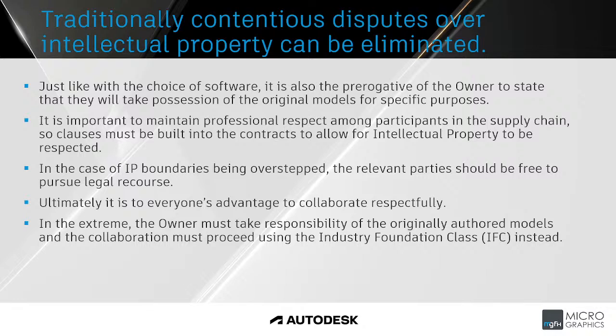Just like with the choice of software, it is also the prerogative of the owner to state that they will take possession of the original models for these specific purposes. It is important to maintain professional respect amongst participants in the supply chain, so clauses must be built into contracts to allow for intellectual property to be respected. In the case of IP boundaries being overstepped, the relevant parties should be free to pursue legal recourse. Ultimately, it's to everybody's advantage to collaborate respectfully, and in the extreme, the owner must take responsibility of the originally authored models, and the collaboration must proceed using the industry foundation class instead.